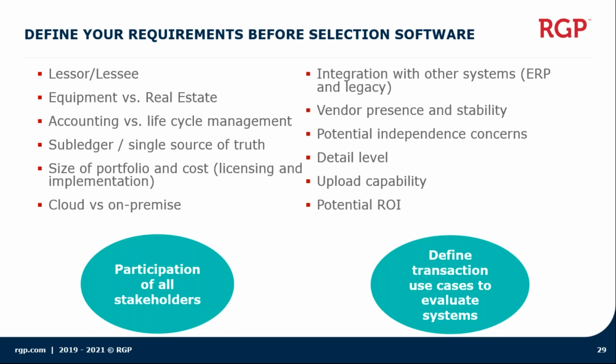before the selection of the software, making sure that you understand your portfolio and some of the intricacies associated with it, as well as understanding any additional stakeholders beyond just accounting that might benefit from the software and what their requirements may be.